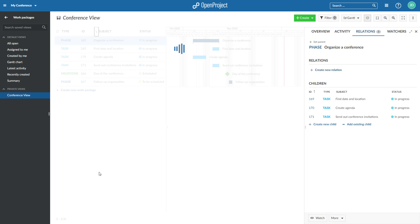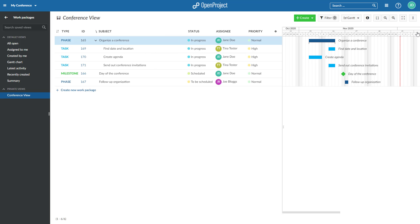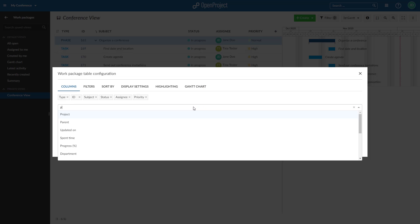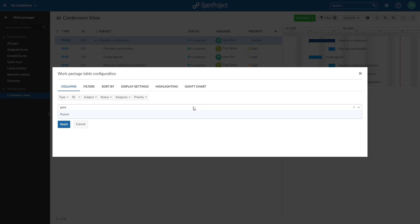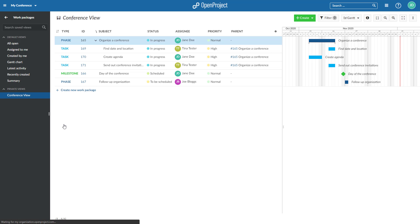You can also add a column with information about parent work packages to the list. In the Work Package Settings menu, click on Columns. Use Auto Completion to search and add the parent column. Click on Apply to display the new parent column in the work package list.